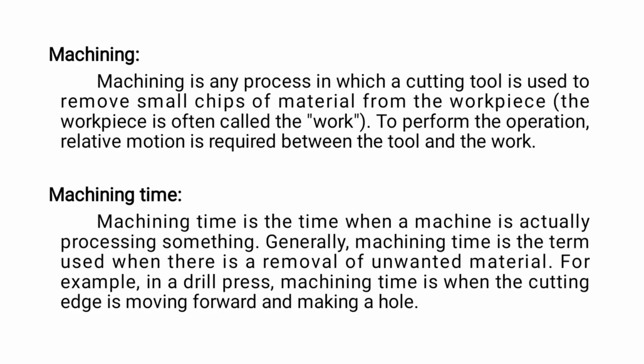The machining cost is to be estimated primarily. In order to estimate the machining cost, one has to calculate the machining time required for these machining operations. After knowing the machining time and rate of machining, the total machining cost can be calculated. Therefore, the estimation of machining time for various operations such as lathe, drilling, boring, shaping, planing, milling and grinding operations is very essential in cost estimation.